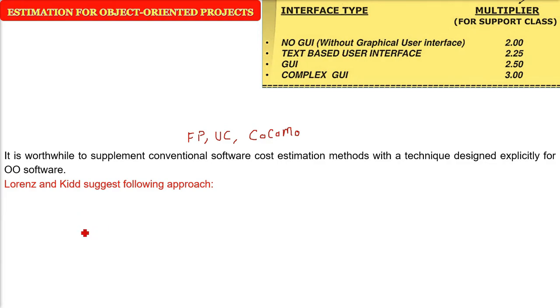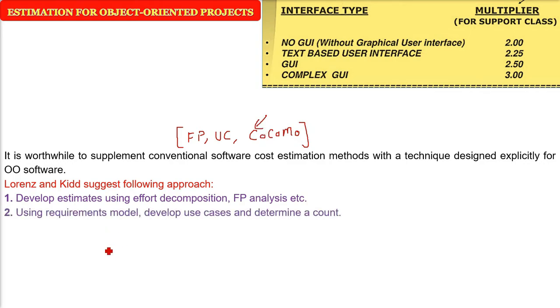Lorenz and Kidd suggest an approach for estimating object-oriented project time, effort, duration, person-months, and cost. First, using the requirement model, develop estimates using effort decomposition, FP analysis, etc. Then use the requirement model to develop use cases and determine the count of these use cases.